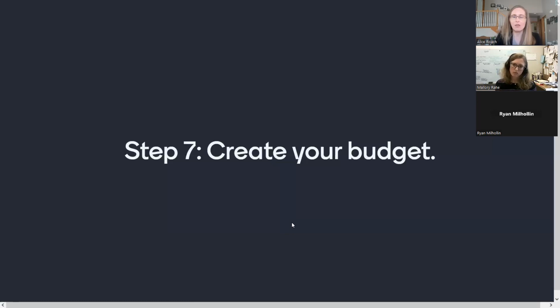At this stage, also go back and reread that RFP to make sure that you're not including any unallowable expenses. So the grant RFP will be very specific about what it's willing to fund and what it's not willing to fund. If you include unallowable expenses, then that could be another opportunity for the reviewers to cast your proposal aside and choose another proposal to fund instead. Or if you're fortunate, the program administrator might reach out to you and say that you included some unallowable expenses, you need to rework your budget. But at the end of the day, the program's not going to fund those unallowable expenses, so it's just better to not include them at the outset of the proposal development.